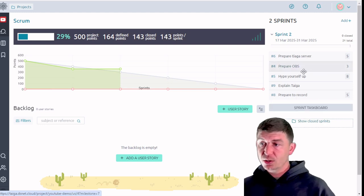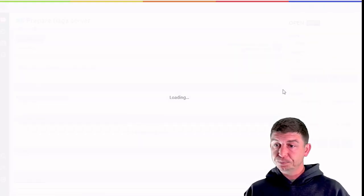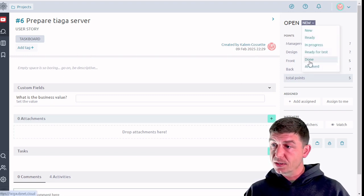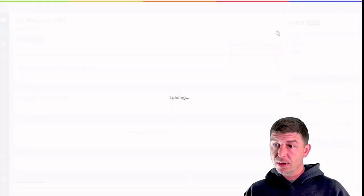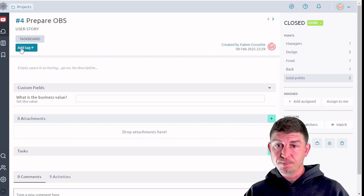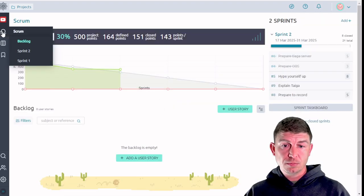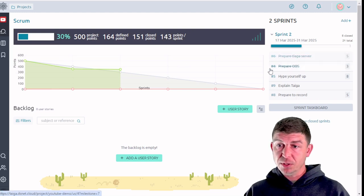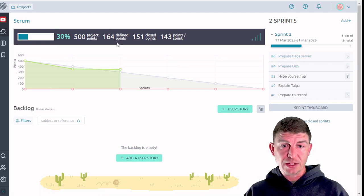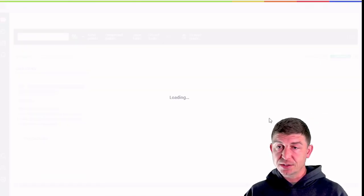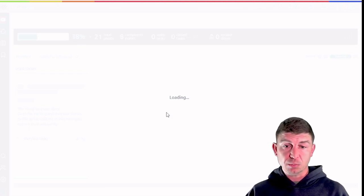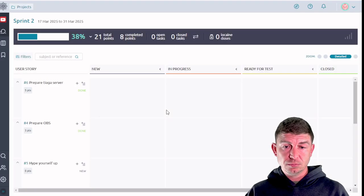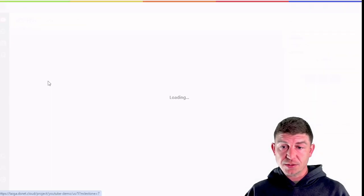So let's go into prepare Taiga server. We're going to go ahead and mark that as done. We're going to go to the next one which is prepare OBS and mark that as done. And then we're going to go back to the scrum board. As you can see these two items have been completed and the number of points have been reflected up at the top. As these tasks or these user stories move through the process and get completed, they will be reflected on the burndown chart.